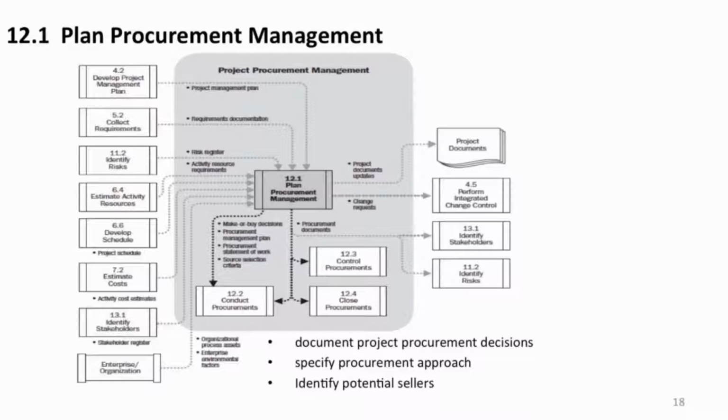Risk is always there, more so now when you're doing procurements. So you have to counter those and manage them like we do any risk, including proper response plans. What if I go out of business or there's a strike in my company as supplier, and now you're stuck? You're not going to get what I want to give you because I can't give it to you. So what's your response for that?